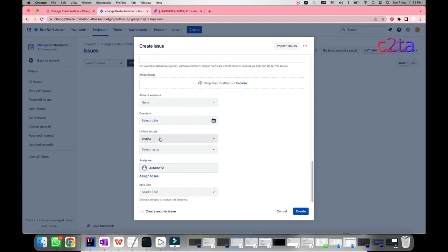And then you can link this issue to another Jira. For example, you have other Jira tasks or stories to test the home page, right? So you can link that Jira here, and you can say this issue is blocking the other Jira, which means this login issue is blocking the home page testing, something like that, so that we can know the seriousness of this issue and they'll fix it immediately.